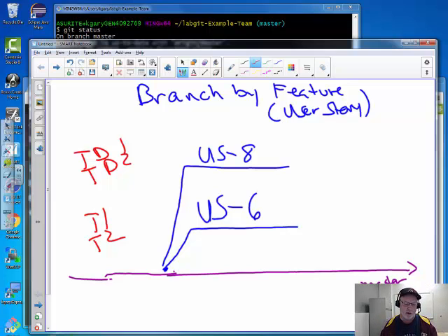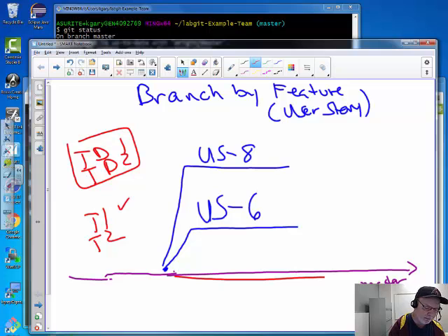But eventually, when you complete all the tasks, you get to the acceptance test of the user story, and now you're ready to say we've got a user story that's passed through everything, and we want to make that code part of the product. We want to put that code on master because we think we're ready now. But if Tweedledee and Tweedledum do that for user story 8, then the entire team, them plus their thing 1 and thing 2 partners, should be able to evaluate what's been done in accordance with the quality policy.